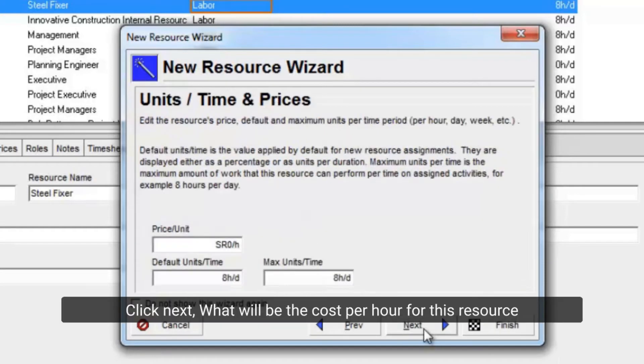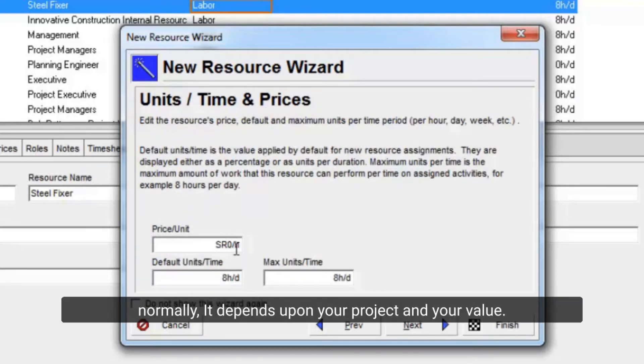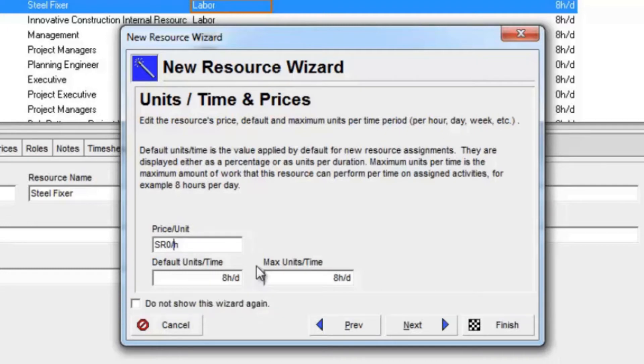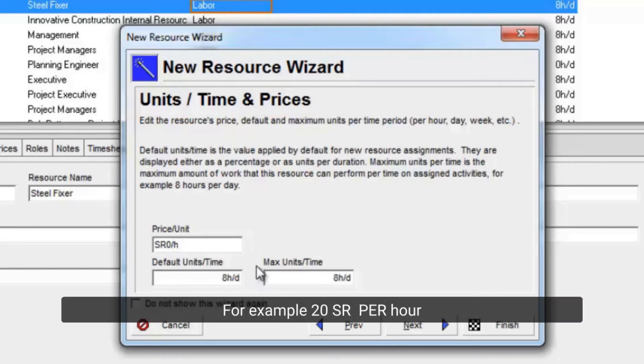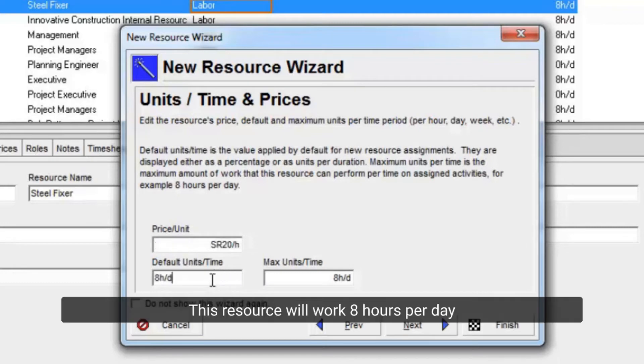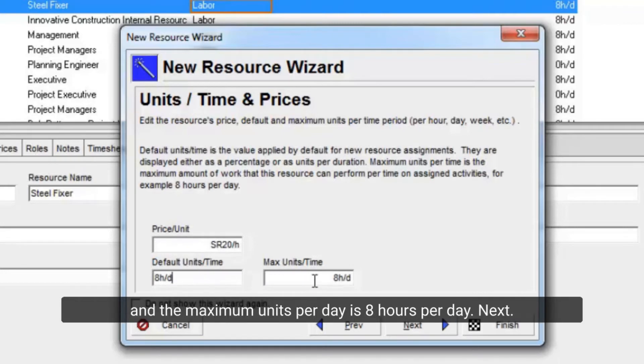Click Next. What will be the cost per hour for this resource? Normally, it depends upon your project and your value. For example, 20SR per hour. This resource will work 8 hours per day, and the maximum units per day is 8 hours per day.